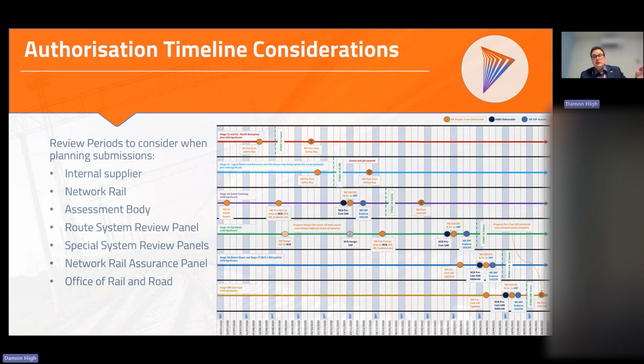So when you're submitting your documentation, possibly 14 weeks out, at that particular point, we want to be saying, well, actually, this is everything that we've got, but we're in control. This is what we still don't have, but this is what we're expecting to come in. This is when we expect it to come in. This is how we're going to validate it so that we know that we're good to go at the point of commissioning.